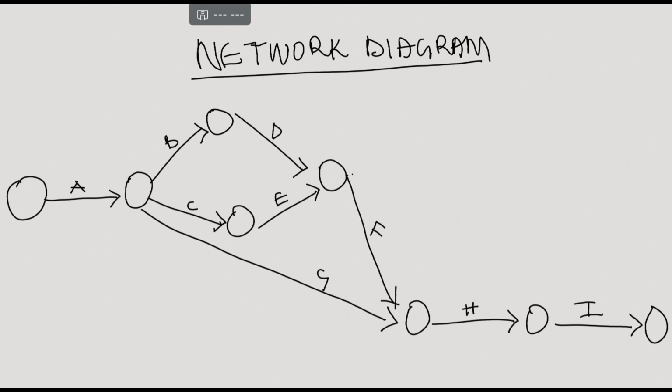And note for the network diagram, it's advisable to use your ruler. But for this tutorial, I have tried to use my hand. When you're drawing the activities on arrows, it's best to use your ruler and show the arrow to show the activity preceding. And then since we're doing the critical path method, we need the activities. So I have to write the preceding activities and the duration for each in weeks.